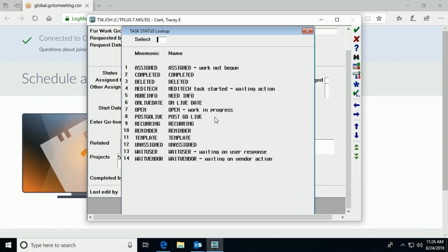Or you can't build it live until live day, or you need to activate it on live day, then we mark all those on live day, what our work list is. Great, yeah. And as is true with searching text, all of these dictionary entries are searchable and reportable. So it's extremely helpful to the Go Live team to be able to say, okay, the day before live, let's pull up everything that has a status of on live date. And we're going to get that work organized for the Go Live.